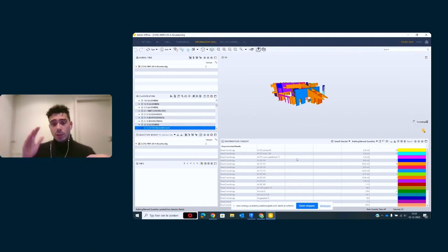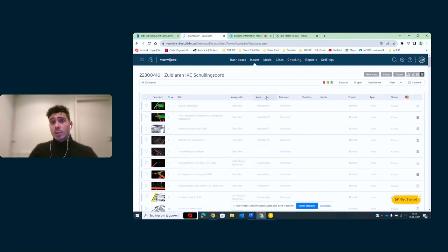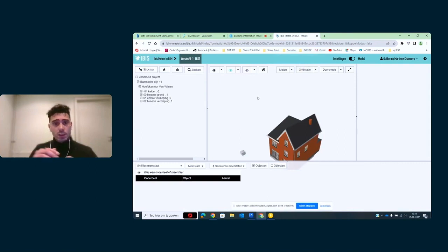These quantities we can combine with our project budget management tool, which is also a latest development, which has a module where you can upload an IFC model, a 3D model, and then gain the information from there, and then combine all the information you need for the budget management with your 3D model.